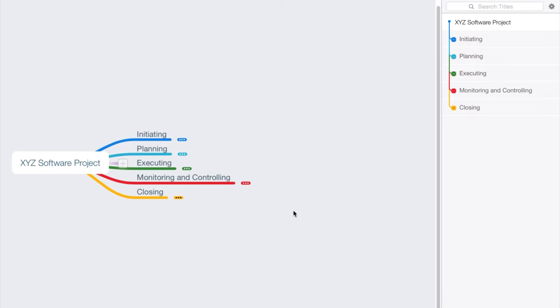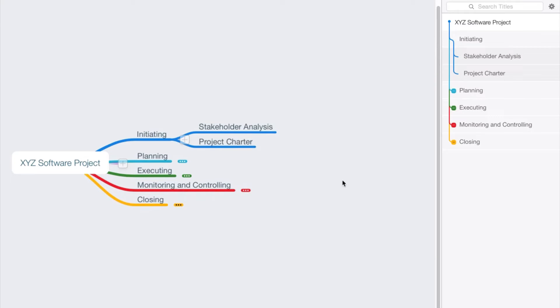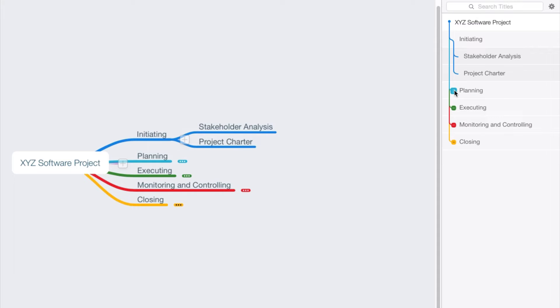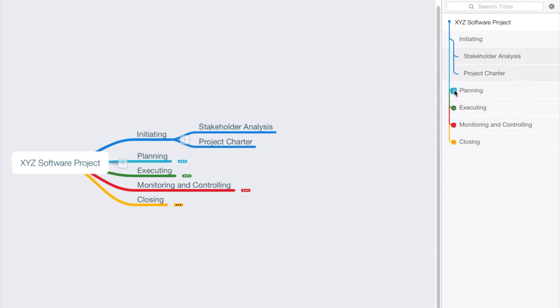So the first level of breakdown we could use the project process groups: initiating process group, the planning, executing, monitoring and controlling, and closing process groups. Then we could break down the initiating process group and we might say, well, there's two things that we really want to create while we're initiating the project, and that would be the stakeholder analysis as well as the project charter.